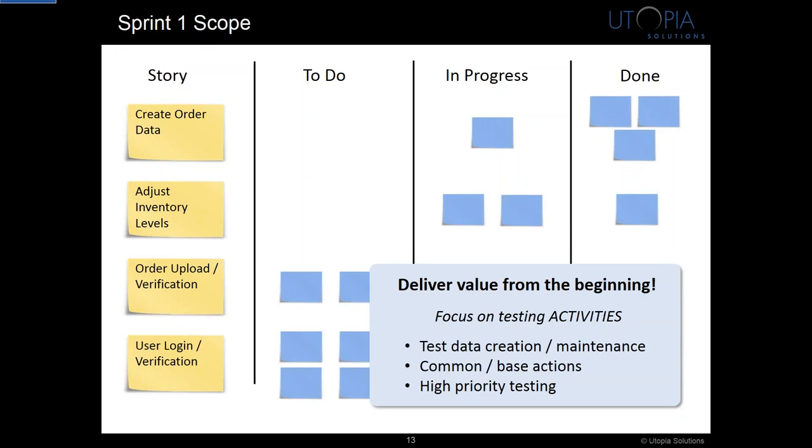One lesson we've learned is that delivering value every sprint is not easy. 2 or 3 weeks for a sprint isn't a whole lot of time. Early on, we very often fell short of this goal, but looking back, it was typically due to trying to stuff too much work into the sprint, either through poor sprint planning or only adding effort mid-sprint instead of trading new features for existing features that were now lower priority.